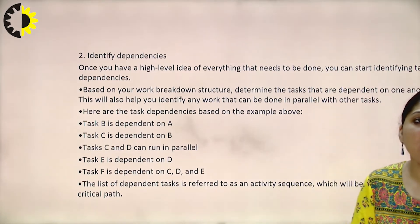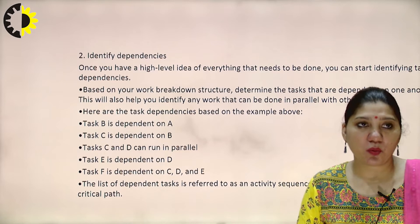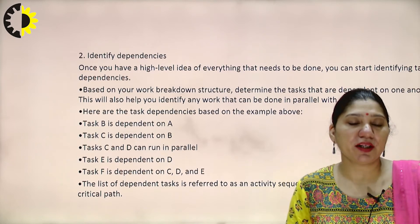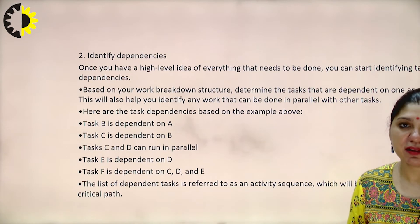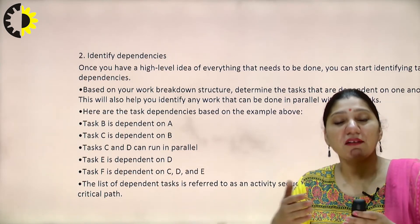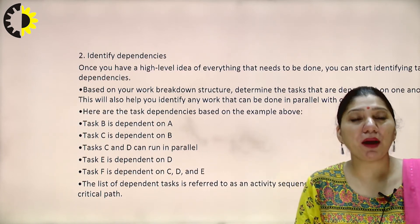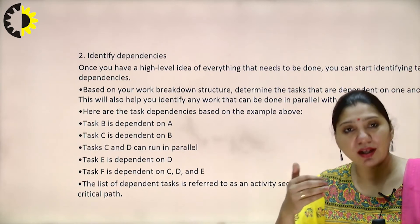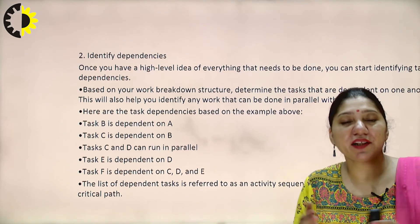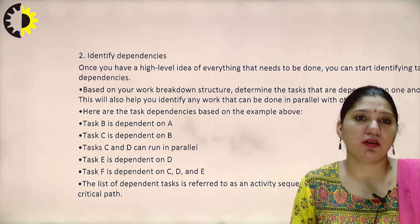Identifying dependencies will also help you identify work that can be done in parallel. Rather than doing tasks sequentially — first, second, third, fourth — which increases project duration and cost, you should identify which tasks can be executed in parallel. This reduces time and cost. Here are the task dependencies from the blog example: task B is dependent on A. Task C is dependent on B. Task C and D can run in parallel — editing the final draft and designing post visuals can be done simultaneously, as they are not dependent on each other.